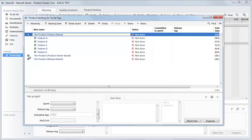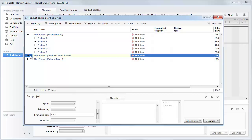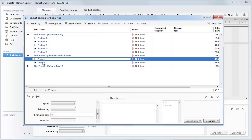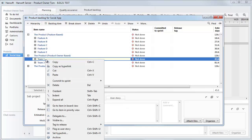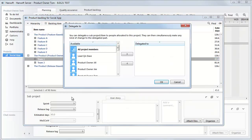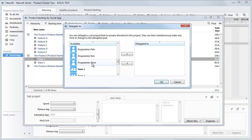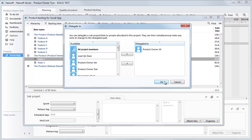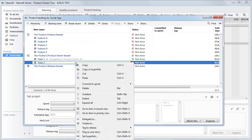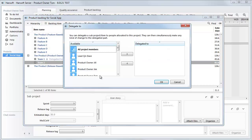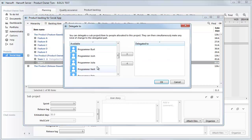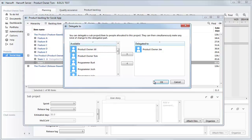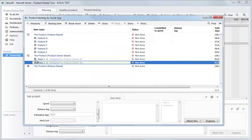The second approach is to structure according to ownership. So in this case, this is a product owner-based backlog. And in this particular example, I assume that we have a product owner per team. And then we can use a feature called delegation, like this. So we can delegate team one to the product owner of team one, which in this case is product owner Jill. And we can do the same for team two. So now we have delegated each of these buckets to the product owners.